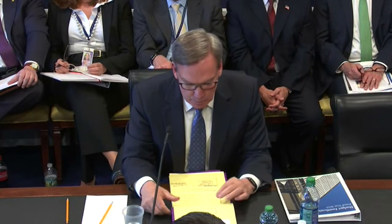You mentioned we do have $502 million appropriated for that, with another about $250 million yet to go to finish that project. And so we've mapped out the minimum amount of funding we need to have each year in the appropriation cycle to enable us to award each phase on time. And that turns out to be $62 million. And so it's important that we appropriate that every single year through the end of this project, and that will enable us to finish it on Phase 4 in 2024.